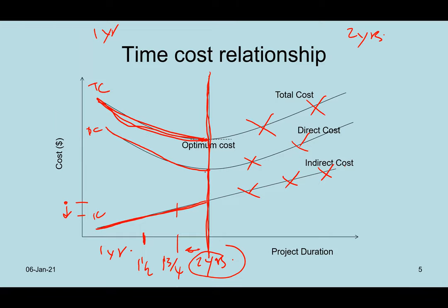direct cost? Okay, direct cost, you just imagine here, this is the point, this is the lowest point, it basically increases. And even for 1.5 years, it will basically increase more from the benchmark there. See, it will increase. And when you want to compress until the end of the available project completion, 1 year, that is the end. You cannot compress anymore because it will become illogical. What happened to the cost of the project? It will basically increase again. Okay. That is the issue.